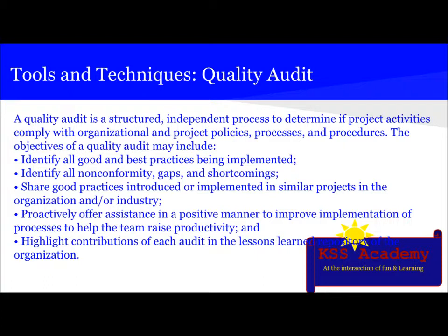The objectives of quality audit may include identifying all good and best practices being implemented, identifying all non-conformity gaps and shortcomings, sharing good practices introduced or implemented in similar projects in the organization or industry, proactively offering assistance in a positive manner to improve implementation of processes to help the team raise productivity, and highlighting contributions of each audit in the lessons learned repository of the organization.